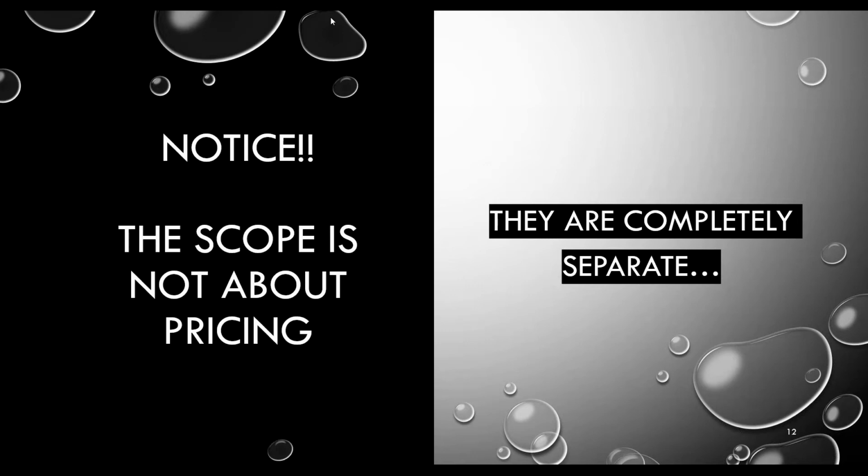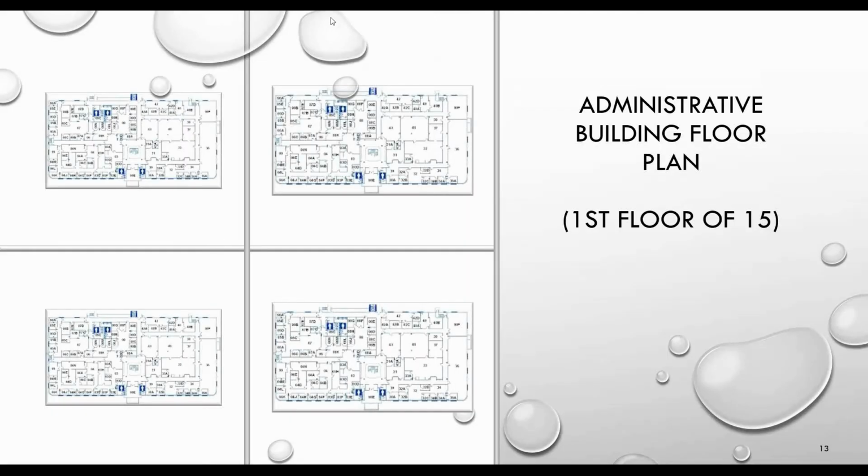Now, you obviously have to have a scope of work before you can start to get price together, because you have to know what you're going to do and what you're going to charge for, and then what you actually did do. If you're following the IICRC guidelines, you also have to have a drying plan. So on your scope of work, you may want to have scope of work / drying plan, because the book says you must have a drying plan. Sometimes that is confused with the scope of work.